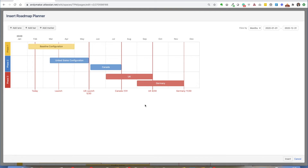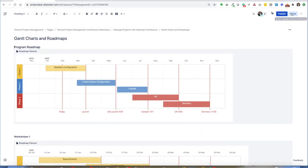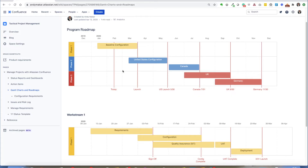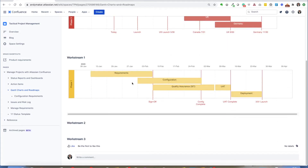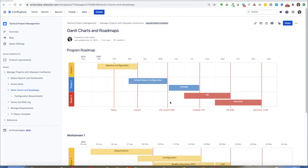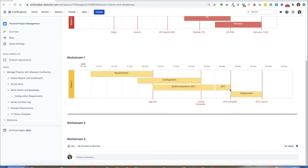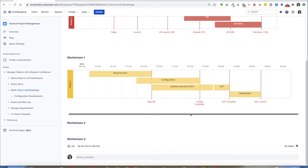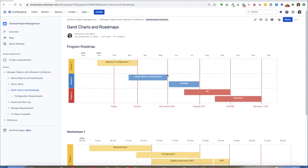If you try to do this in Excel or PowerPoint, you know what a pain it is because you're having to do arts and charts in a tool that's really not designed for that. That's why I love the roadmap planner — it's an easy macro that comes with Atlassian Confluence. You can have a program level roadmap and then look into a Gantt chart at a more detailed level for a given phase. In this case you've got several milestones for sign-off, configuration complete, user acceptance testing, and hitting your key launch date, so we can manage at a more detailed level as well.